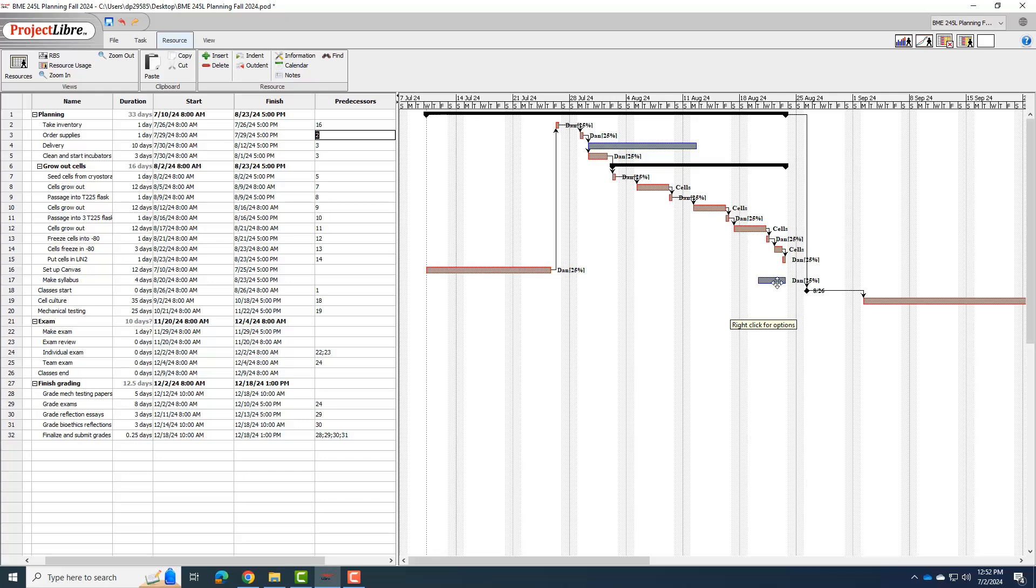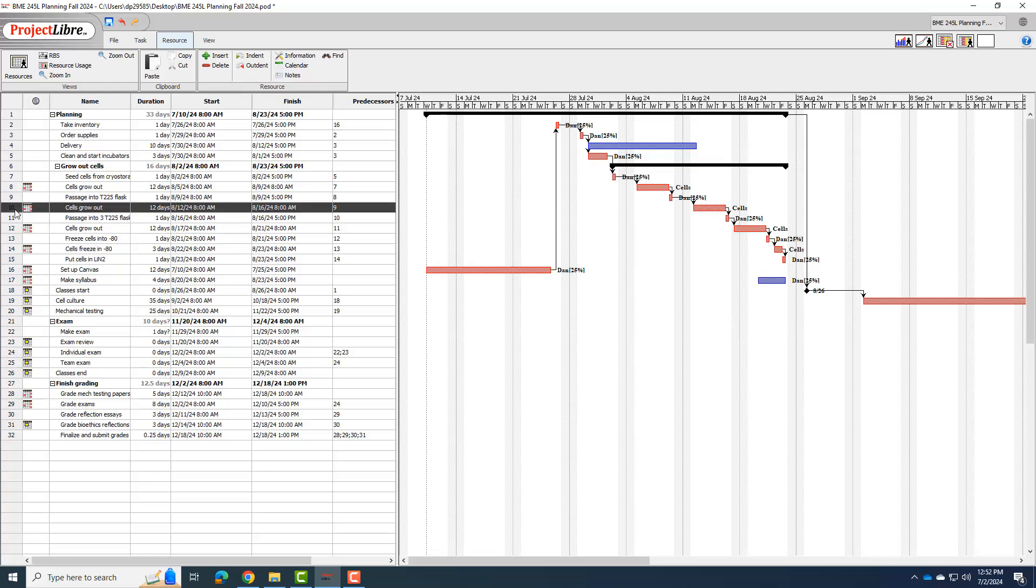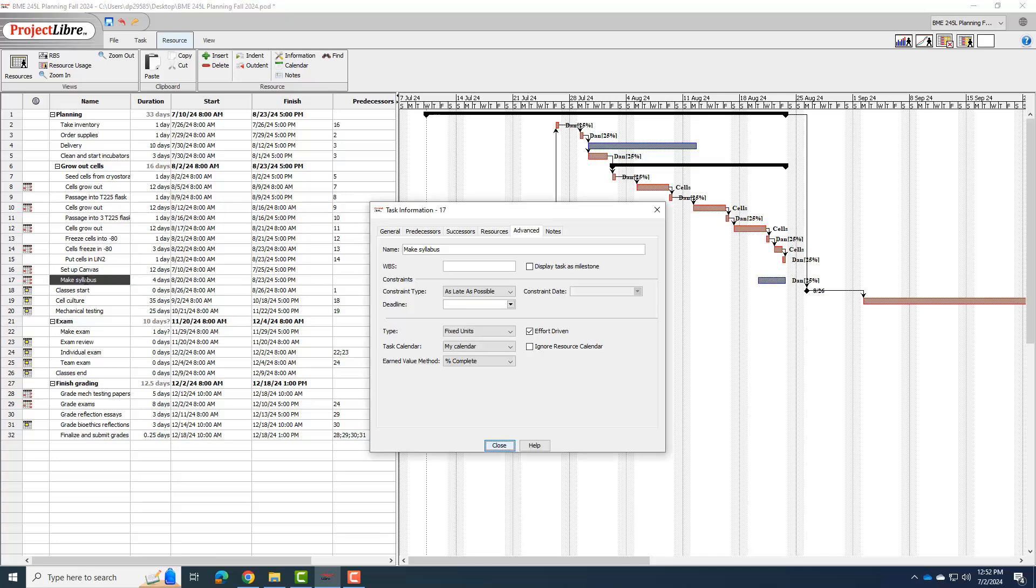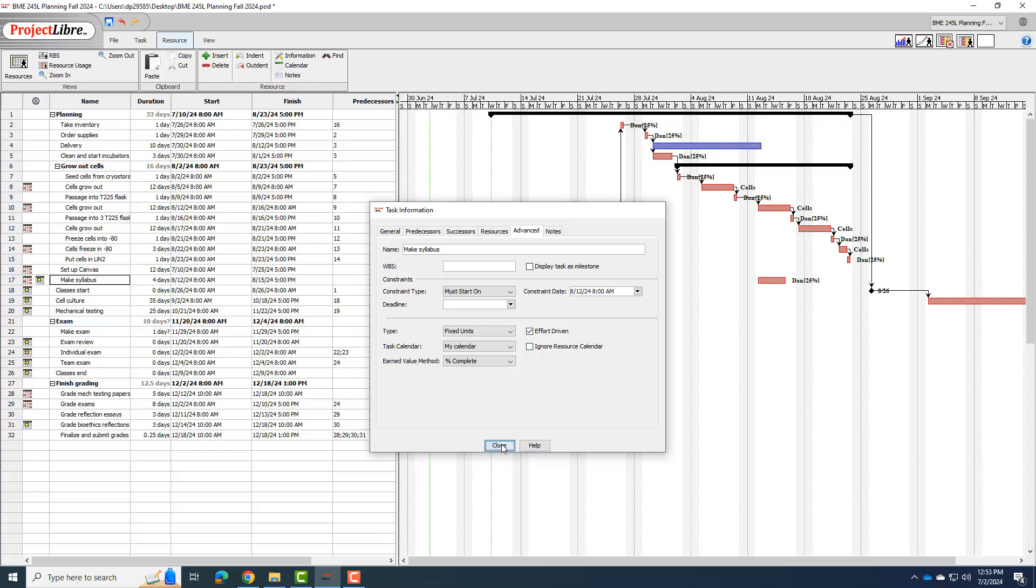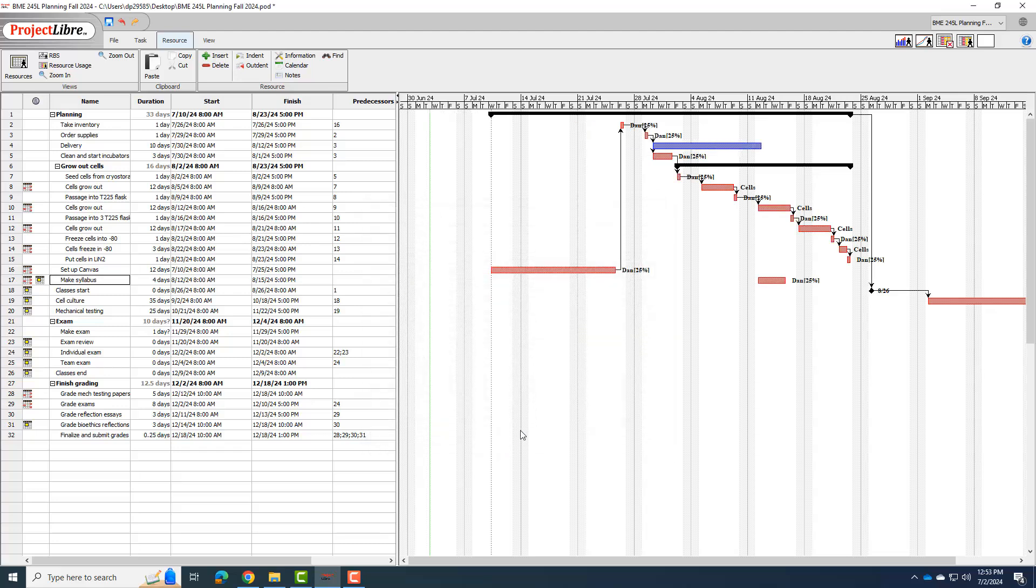So in order to do that, I'm just going to kind of manually pick a time. Let's say I want to work on the syllabus when the cells are growing out here. So I look at the cells growing out on line 10. That's happening 812 to 816. So I'm going to go to my make syllabus, and as soon as it says as late as possible, I'm going to just say must start on, and again, I'll put my date of 812 when those cells are growing out.